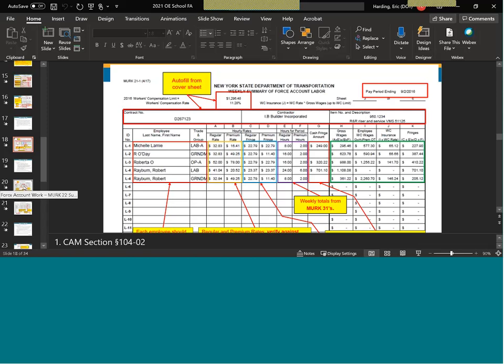At minimum, your workers need to be paid the prevailing wage rate schedule. If you do have a discrepancy between a union agreement and the prevailing wage rate schedule, DOL has been known to make modifications to a specific project schedule, and or they will send out an amendment to a published schedule to rectify problems that are brought to their attention.